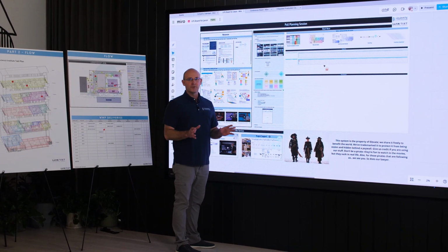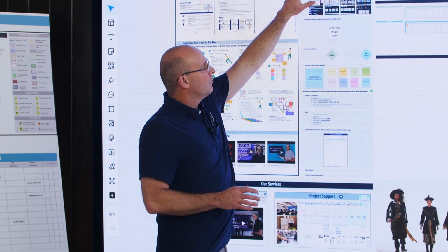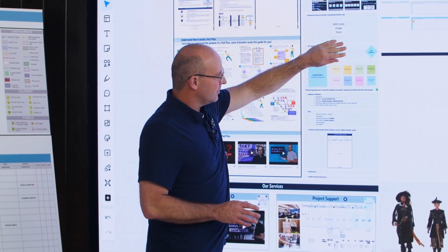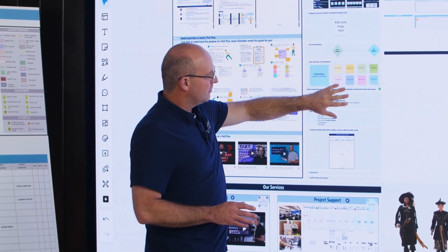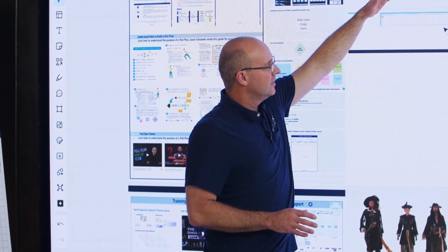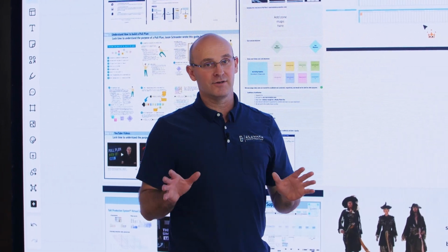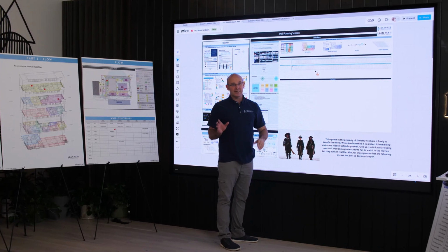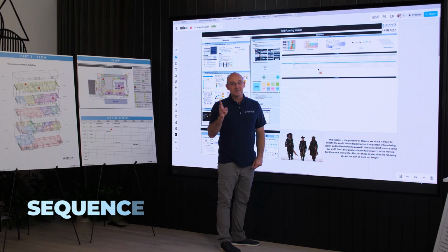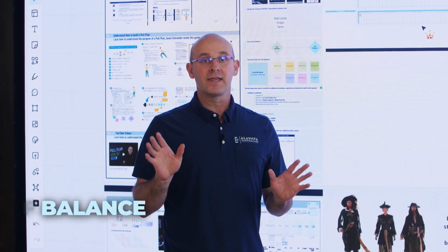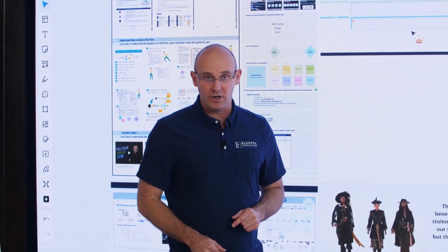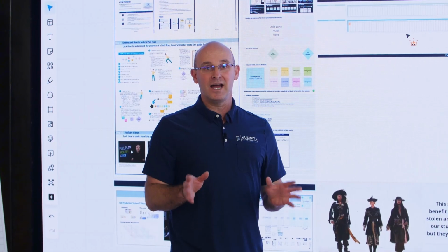So when you go to do a pull plan, you have segments here where you can do your pre-work, where you can add your zone maps, identify your milestones, allocate stickies, and then come up with the rules of the game. And then we have swim lanes up here with your visuals to go ahead and do your pull plan. It's absolutely phenomenal. So this is available to you at any time. And remember, you need that macro level tack plan end date, sequence, and line of balance if you want to do it right. Now I'm going to show you a video and talk about a couple of key items as we go so that you can see how this is done.